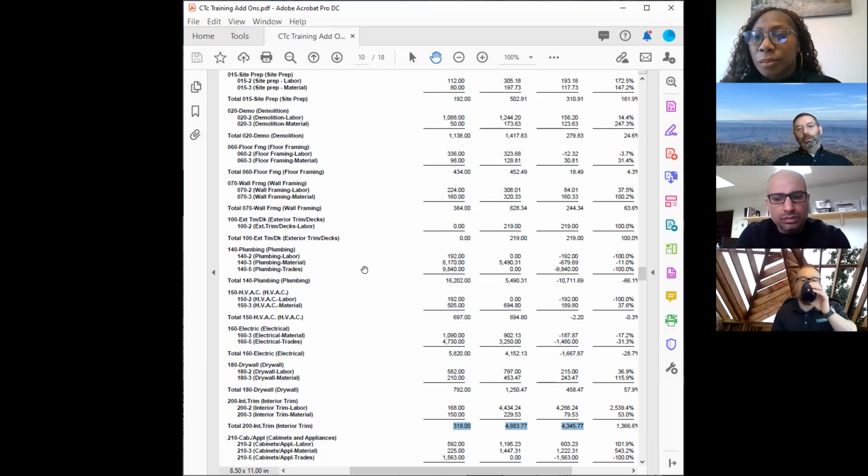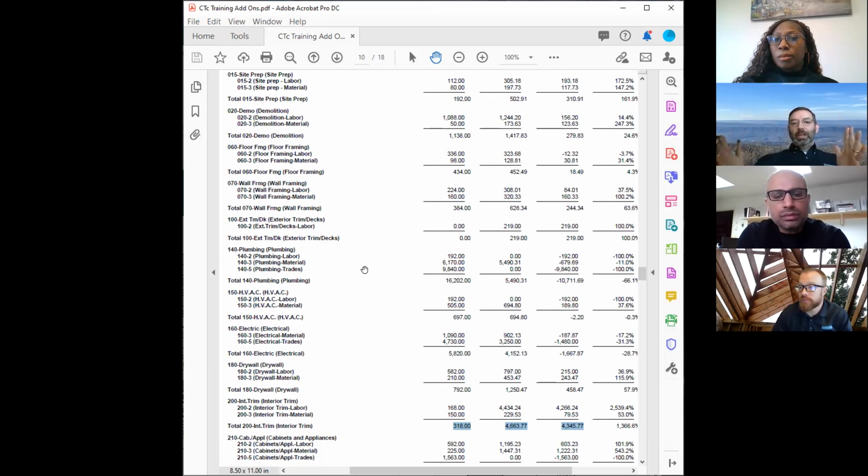So it's super critical to keep an eye on this item, because in between those every other week, labor hours can run, especially on an intense project like Trask is framing right now, Selaznik is framing right now, Ruelis is framing right now. That's an intense 2 weeks. A lot can happen in 2 weeks. So when you see things starting to go a little bit sideways, you want to look at it, because you have 2 weeks to manage that before you get a report with all the information of what happened. This is a great leading indicator, and something we want to be on top of as we're looking at our job costs.